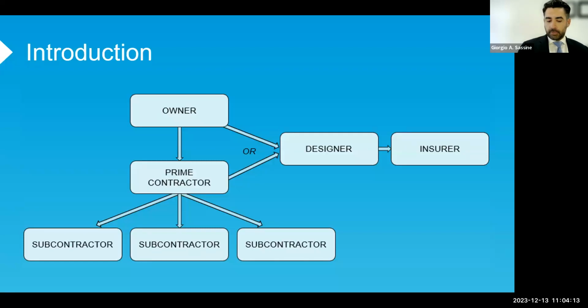Simple enough? Not quite. Delays often arise. For example, when materials are not delivered on time, when the owner changes the specifications in the middle of the design, when the designer has to make revisions to the design, or when the project is not constructed according to the design. In such situations, delay experts may need to be called in to determine the extent of the delay and what impact it has on subsequent work. And with so many entities involved on a complex construction project, attorneys may be called in to argue over who is liable for the delay.